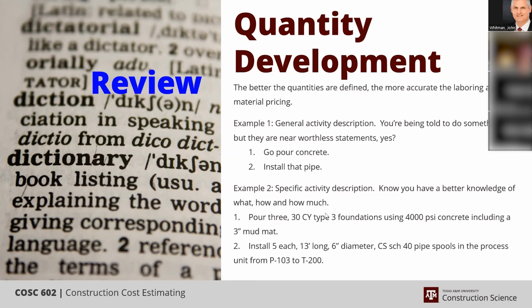So it was forming a lookup, so you had to pull in something that was very descriptive and met the requirement of the lookup. But the other one it was free flowing. It's whatever you wanted to put in there. So you could then add that it's for this foundation or it's this PSI or whatever it needed to be to make the two descriptions work together and tell you what it is.